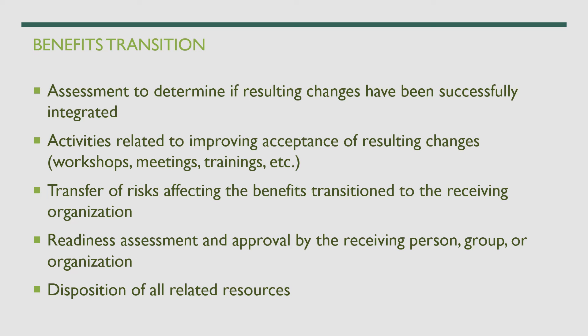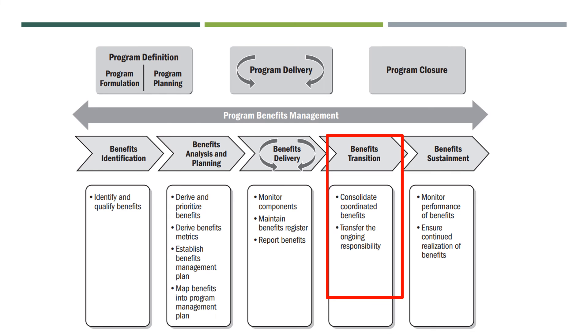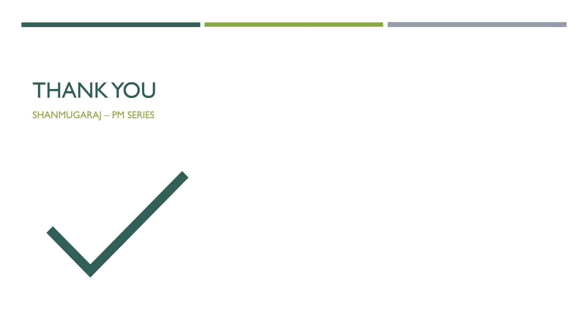Make the receiving organization ready — assessment and approval by the receiving party is very important. They must assess the deliverables and formally approve that they are taking over from you. The disposition of all related resources also occurs here: you can dissolve resources from the program or move some to support and operations. These are the activities involved in benefits transition. In summary, you consolidate and coordinate benefits, and transfer ongoing responsibility — including program ownership, risk, people involved, and resources.